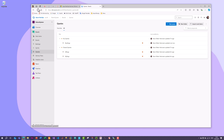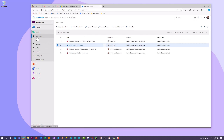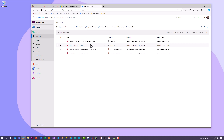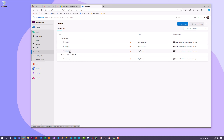To summarize how to use Azure DevOps for bug reporting: go to Work Items, click new work item of type Bug, and you'll get a form to fill in. For tracking bugs, use the Queries section where you can create queries like 'All Bugs', 'My Bugs', or bugs reported today.